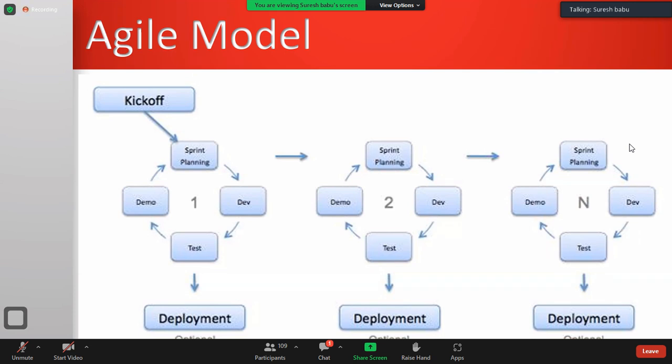Then assign the work. You develop the first 2 features, you develop the next 2 features. You write test cases for the first 2 features, you write test cases for the next 2 features. By day after tomorrow, I want the output. We are not making a 2-month schedule, I am making a 2-day or 1-week schedule. Work is split into small components, assigned to team members, given time deadlines, and reviewed. You are focusing on how many features? Totally 4; out of 4, you focus only on 2, and the other person focuses on 2. You focus on a small amount of work, so more focus will be there, correct?